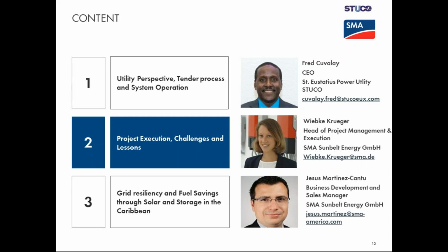Thank you very much. Yes, I didn't mention the project. The guttering system is completed. However, the project itself, channeling the water to our already built system, will be completed in 2 to 3 weeks. And then we will have the system completed, and we will just wait on rainfall to fill it up, and the government also is expected to put in their water catchment system within the next month. By gravity, the overflow from my system will feed into their water catchment system.